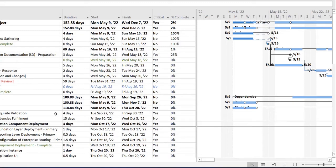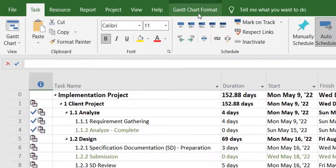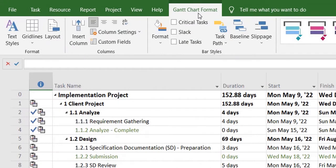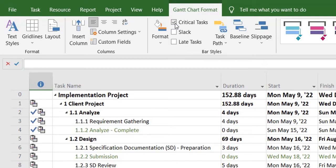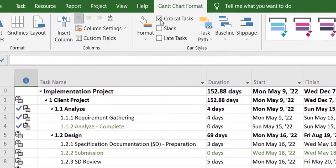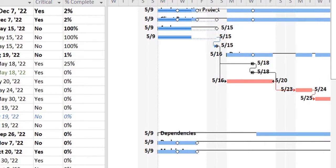First, I'll head over to the Gantt chart format tab. Over here you can see there's a checkbox that will show you the critical tasks in your project plan. As soon as I tick mark this, you'll start seeing the critical tasks in your tracking Gantt chart over here.